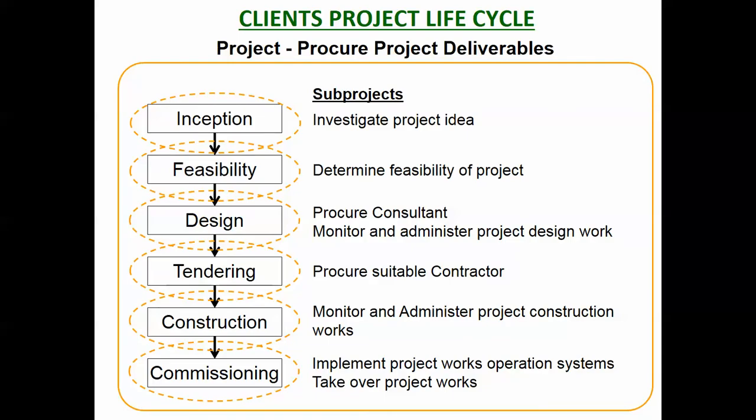Now, looking at the life cycle, the project is really a whole lot of small projects. So there's the big project, the project which is to build the building. But within it, there's a whole lot of little projects. So for the client, there's the inception project where he's figuring out whether he wants to do it or not. There is the design project where he procures design services for the design of the building.